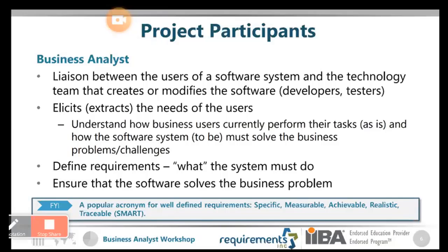Because sometimes you might have a great idea that you can't shoot down, but you might have to negotiate with your users and say, you know what, we'll put it on the parking lot and then we'll revisit it. We'll certainly have an opportunity to address it at a future time, because we need to meet this deadline. We have to deliver something on January 17th. So let us figure it out for the next release, maybe 6 months down the line. I don't want to completely ignore the idea, but at the same time, I don't want to do some band-aid which will not give you exactly what you're asking for. Let's invest more time into this because this is a great idea.